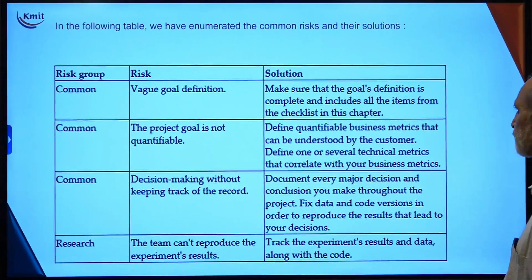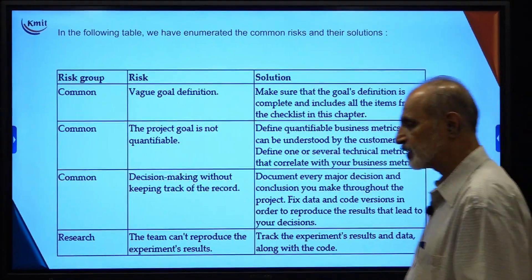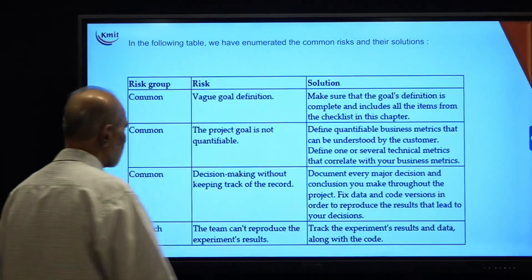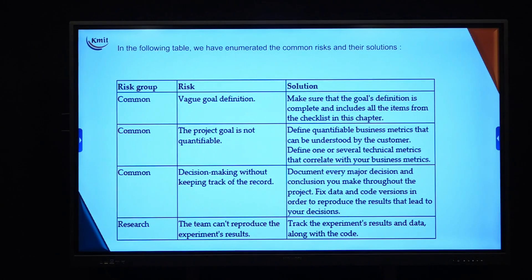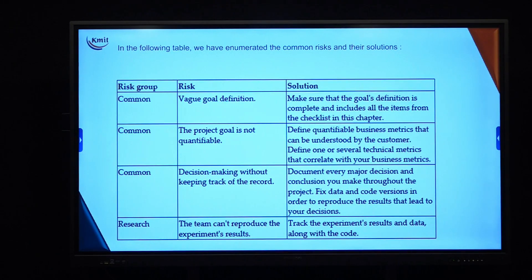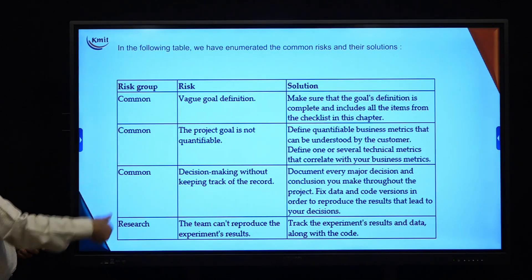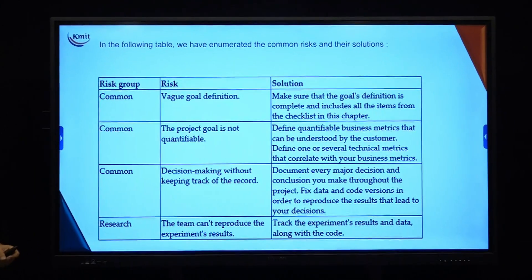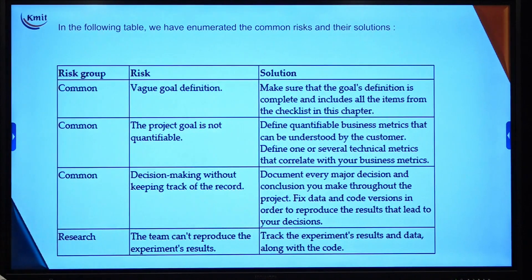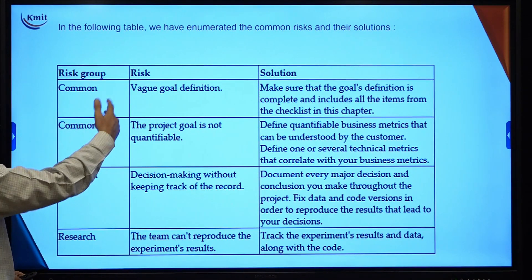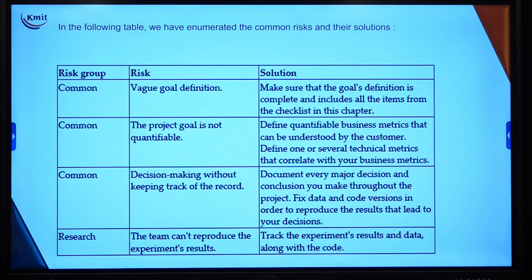A risk table lists the type of risk group, the risk involved, and the solution we are seeking. Under the common risk group, we have: vague goal definition — the solution is to make sure that the goal definition is complete and includes all items from the checklist. Second, project goal is not quantifiable — define quantifiable business metrics that can be understood by the customer, and define one or more technical metrics that correlate with your business metrics.